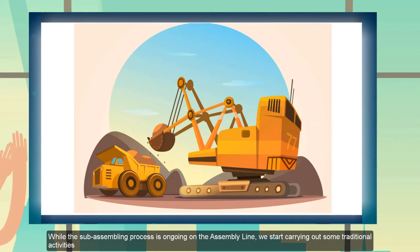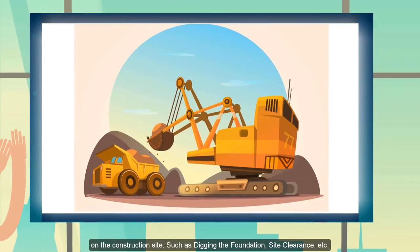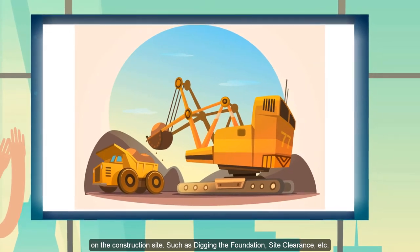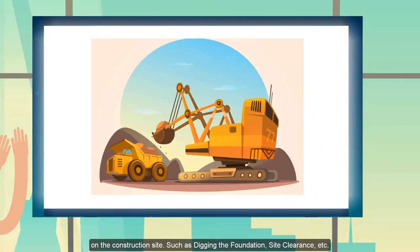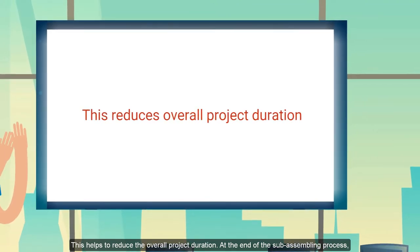So while we carry out assembly on the assembly line, we begin to carry out some traditional processes on the site. Such activities include laying the foundation and site clearance. We carry them out simultaneously, which helps to minimize the amount of time spent on the project.